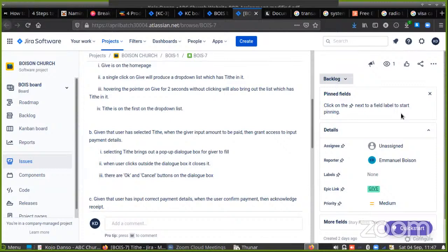So if at some point in time you don't freeze the requirements, that's a very important step. You got to be able to freeze the requirements and say, at this time, you're not entertaining any new feature or any additional changes, right? If there are other nice features that people are talking about, you capture it and it goes in the backlog. You prioritize it, talk about it, it goes to grooming and refinement. And then if it's worthy of considering, of course, when I say worthy of considering, you guys remember the business value piece when it comes to user story, right?